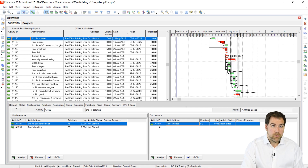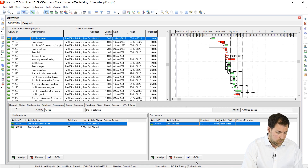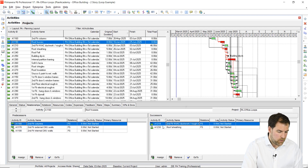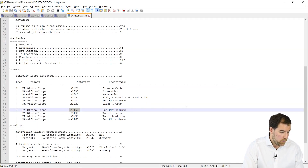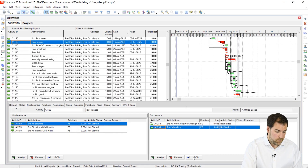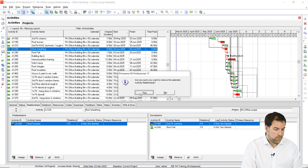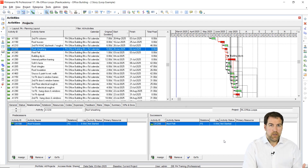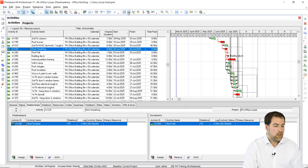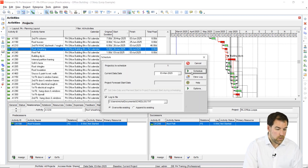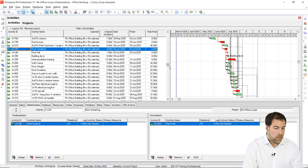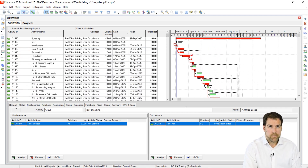Let's use the go-to button to walk through the relationships. Starting at second floor columns, we're going to roof trusses. From there, is it 1210 or 1230? I'll flip over and check — it's 1230. So let's go to A1230, and there we can see our circular loop back to second floor columns. Let's remove that to fix the circular relationship. If I need to add or replace that relationship with a proper one, take this time to do that. Now let's see if the schedule works — click schedule, click schedule one more time — and it looks like we've successfully scheduled the project.